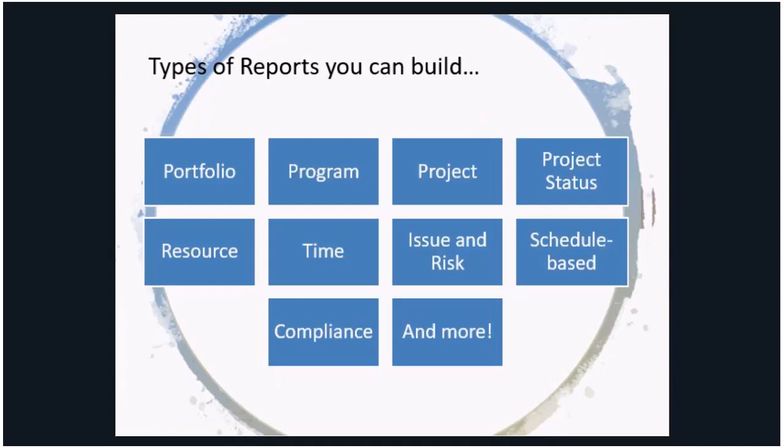We have a lot of organizations that do schedule-based reporting. They want to do compliance metrics on schedule, on cost, on resources, doing things like earned value. We're getting down to the next level and doing within a detailed schedule, where are we on or off schedule, on or off budget. And things like compliance reports. Who is submitting their time? Who is baselining? Who is not baselining? Do I have orphan tasks that are out there that aren't connected to anything within specific projects? These are some examples of the types of reports you can build and leverage within the Power BI service using Project Online. So really, it's limitless the types of reports you can build.